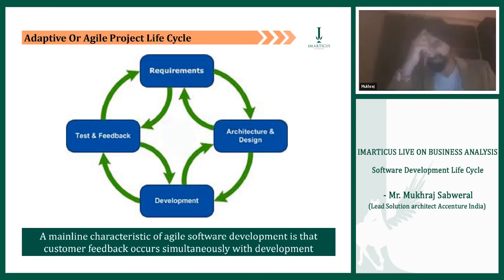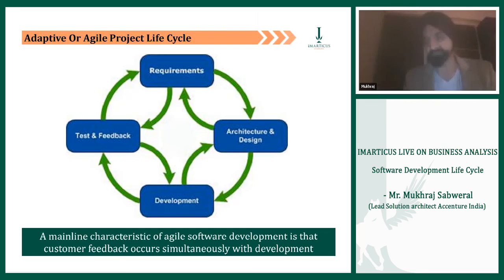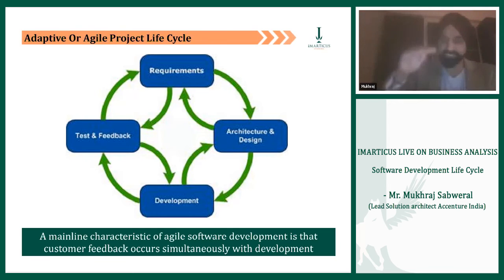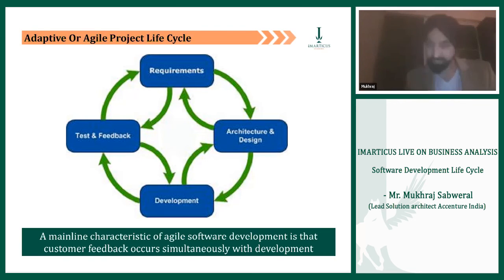We break a larger component into smaller sub-components and keep putting them into the funnel. In that funnel sit business analyst, designers, coders, and testers — they keep picking up small designs and continually developing them with help from each other. As small components generate themselves into final products, you're building up a stack of sub-components to give the full cycle product. Risk is less because you have better control: components are small, easy to understand, flexible to design, easy to code, and quick to test.